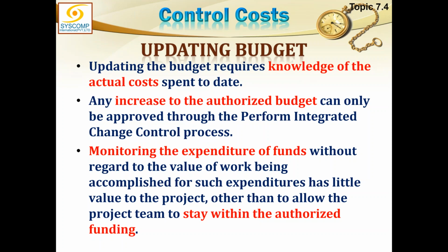Monitoring the expenditure of funds without regard to value of work being accomplished for such expenditure has little value to the project. If I am just monitoring the funds, how much funds have been expended, that doesn't mean that much job has been done. Maybe you have been losing money in something else, but you are charging the project for that.